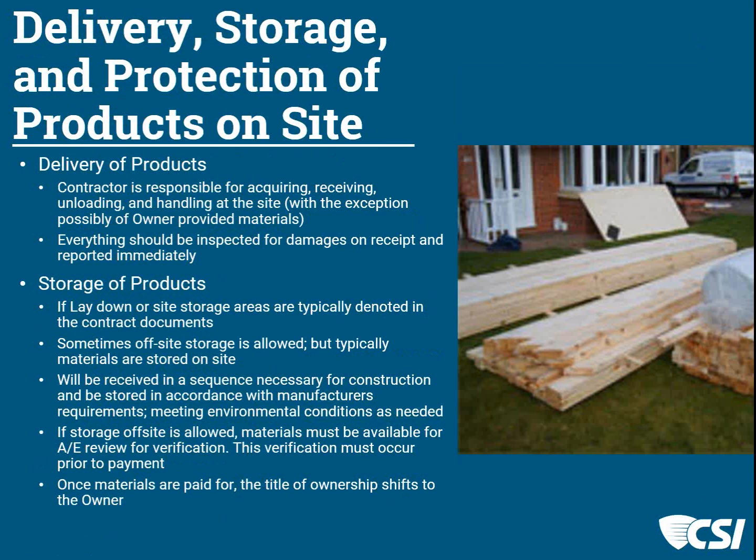Sometimes, often with those of you that work in the city, particularly large cities, there may not be any on-site storage, and all of that is off-site. Typically in North Carolina, we don't do that. Government does not like for materials to be off-site, but if they are, they can be bonded and insured in locations that the state accepts and be off-site. And then if they are off-site, they have to be received in some sequence that feeds the construction schedule, but also meets the environmental conditions that are specified for those materials. So that will be important to see happen.